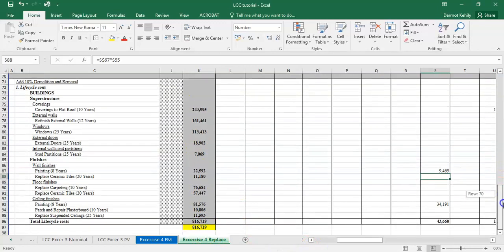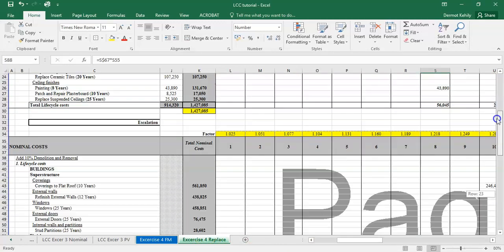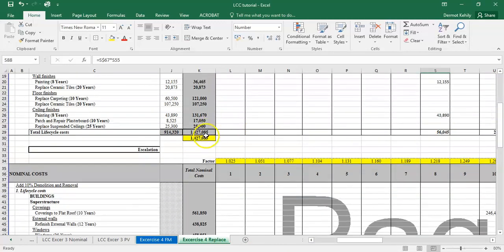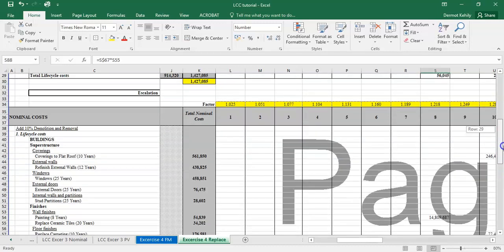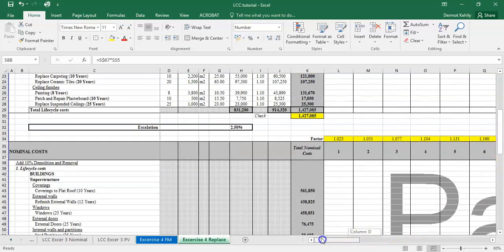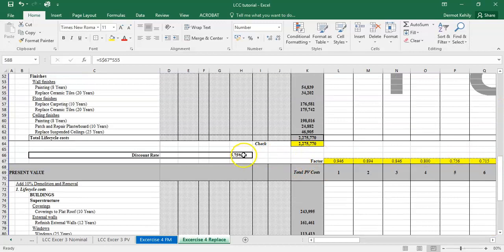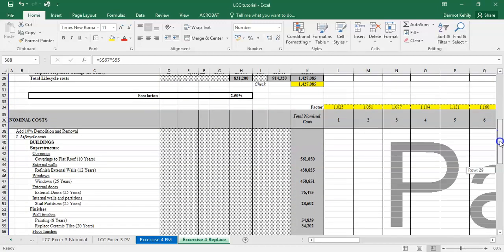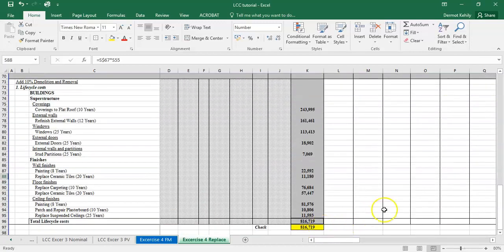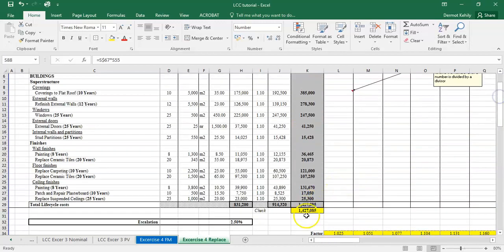You can see that your present value calculation is a bit less, or a good bit less, than your real costs, and that is due to the difference in, I suppose, the discount rate and the escalation rate. Because the discount rate is significantly more than our escalation rate, we're going to have a present value that is less than our real costs. So that's the logic behind that, which I explained before.